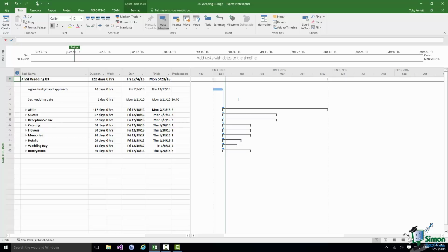Milestones are used for a number of different purposes, and amongst the most important ones are as a way of providing a management snapshot of progress on a project. So there is, for example, a particular report called a milestone report, where you can just view the key milestones in the project and get a summary of where you are in terms of those milestones, which in turn gives you a good idea of general progress on the project.